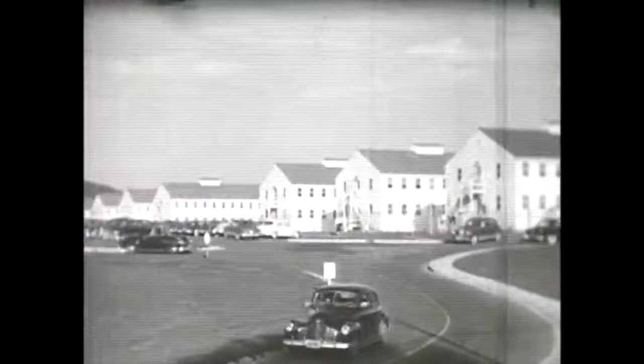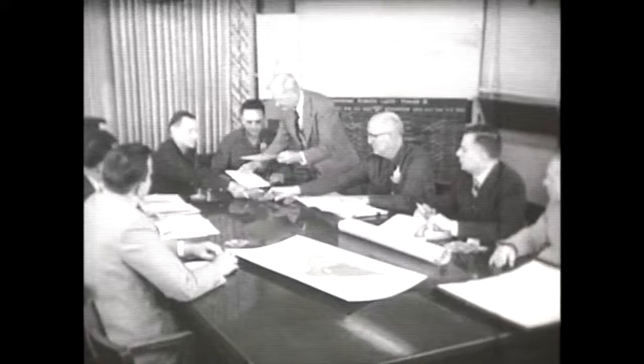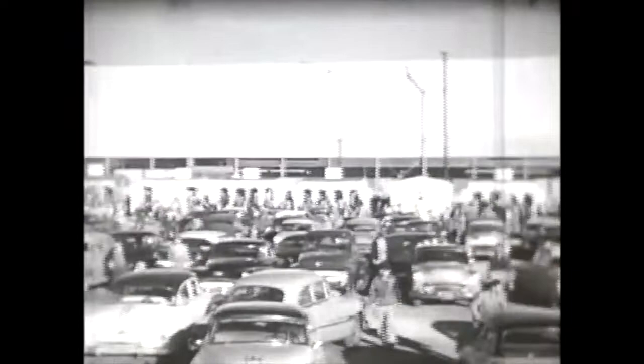The Oak Ridge operations of the AEC set up an organization designated the Portsmouth Area to direct construction and operation of the new plant, to develop design criteria, to select architect engineers and construction contractors, to schedule delivery of critical materials, and of course, to anticipate every possible contingency. Coordinated teamwork was thus achieved between government, industry, and labor, which contributed greatly to the success of the project. Labor and management cooperated to set up uniform agreements, with the result that the number of stoppages for the Portsmouth project is one of the lowest in AEC records.